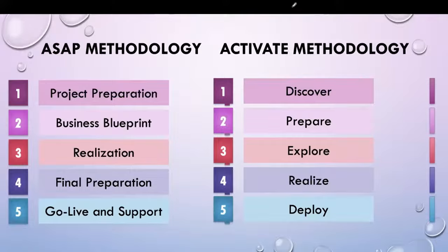All those activities are involved there. And finally, run. Run is like go live and the initial hypercare support. Even in the deploy phase itself, a little hypercare will start, because all the changes are moved to production, and some downtime is expected from the business. So these are a few things you can see, like in SAP methodology.